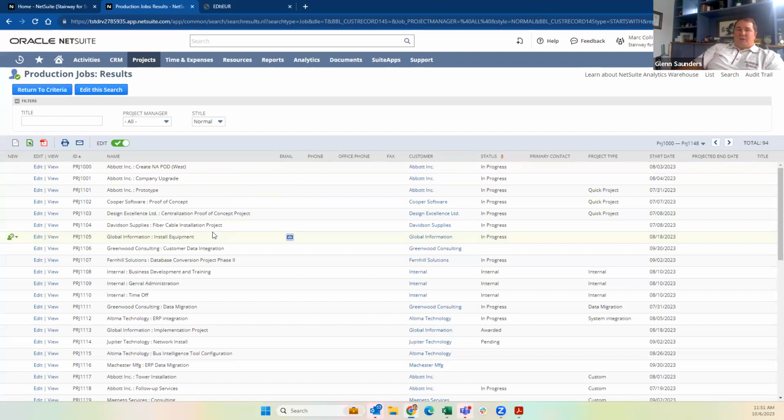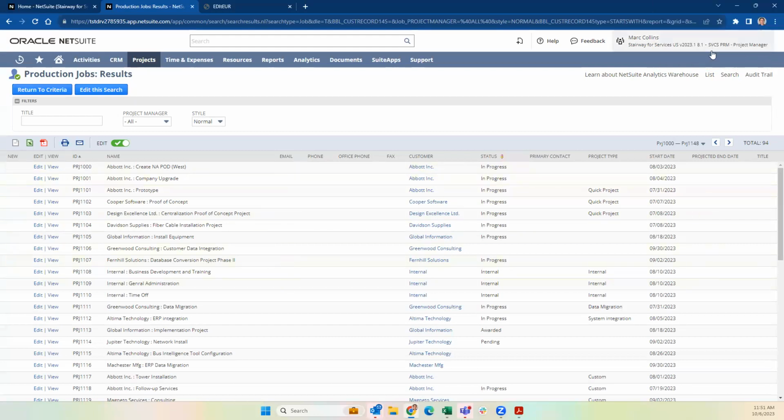The other option is you can create what's called a mass update, or you can do a CSV import to update that information. So if you need to update the title associated to a variety of different jobs, you could probably do it via mass update, because you would have some common denominator across the different production jobs or tasks that would relate to that title. Does that make sense? Yeah. Okay. And by the way, use project ID as a primary key and update relevant fields.